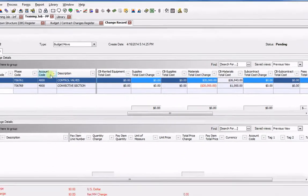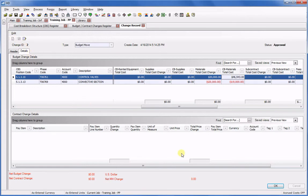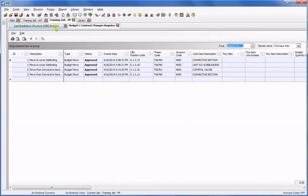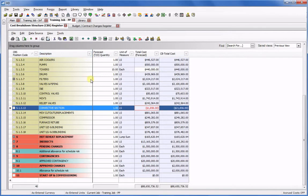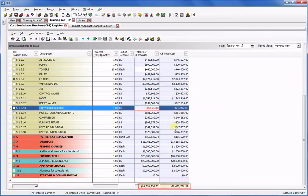I click Approve, and now in the CBS, I can see the reallocation of money in my budget. My bottom line amount is still the same, but I can see the negative amount on the convective section that I'll need to make up.